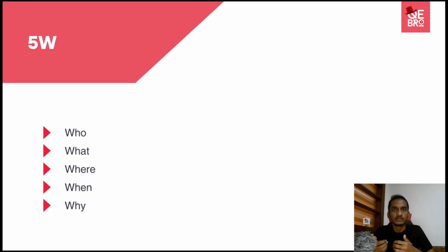So that means who will be doing these things, what and where, again the environments. Performance testing will be done at the perf environment. Then we have the schedule and the high-level estimations. So that's when, and why. That is our objectives and those things. So we can follow this 5W approach at our test planning stage to make it more complete.